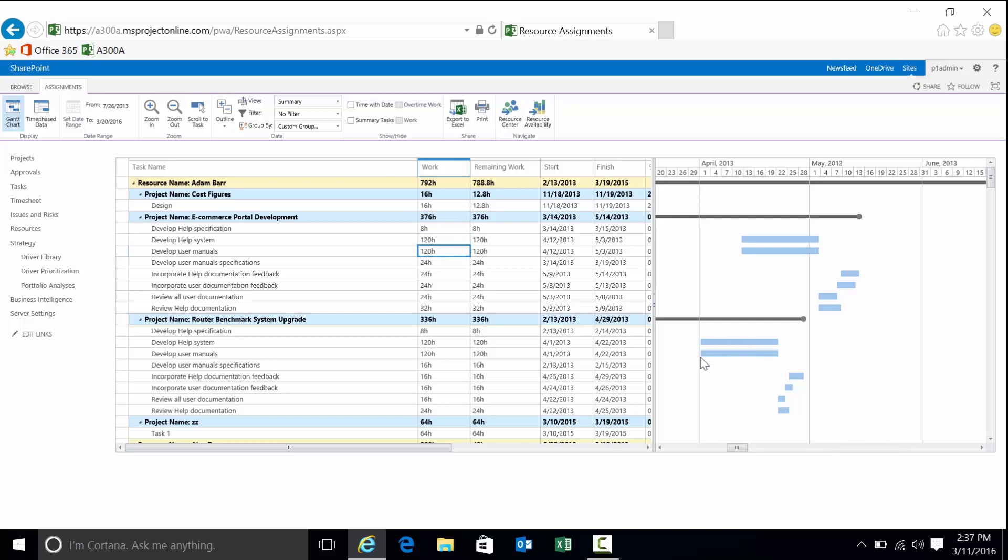Another overlap here. Another 401 to 422, exactly three weeks in another. 120 hours, so another full-time FTE. Another 100% overallocation. And if you look here, you can see that all four overlap right here. It's a very big overallocation. It could be a situation where at one point in time these projects, there was no issue. This project may have slipped quite a bit, and therefore this became a big issue.